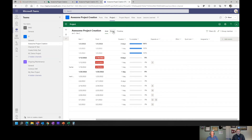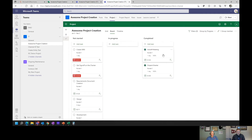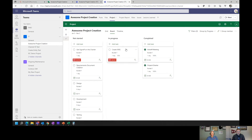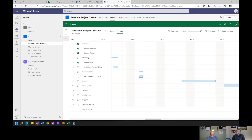To look at this as a Kanban board, all I have to do is switch to board view. It defaults to bucket, but I can change that to progress — and that's actually a Kanban board. I can take tasks and move them from in progress to completed just that easily, and if you were looking at the project schedule from the other angle, you would see that happen in real time.